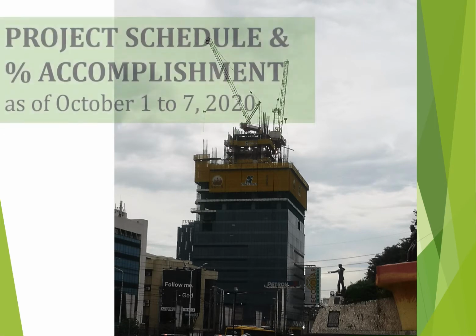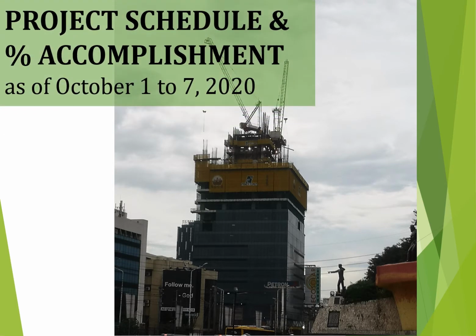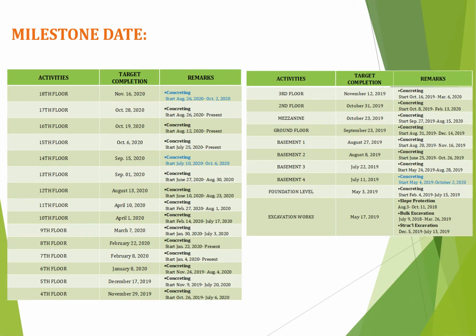Project schedule and percentage accomplishment as of October 1 to 7, 2020. On milestone project update, the weekly update of closed out floor for concreting is the 18th floor, which was completed last October 18, 2020; 14th floor, October 6, 2020; Basement 4 SOG, October 2, 2020.